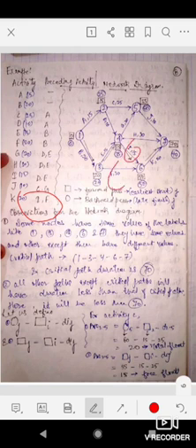I is here, F is here, both will be finished. You can terminate them at node 6, and then activity K will be started at node 6. As it is a rule that we have only one start and one finish for any precedence diagram, we will merge or terminate all activities J, H and K at node 7.